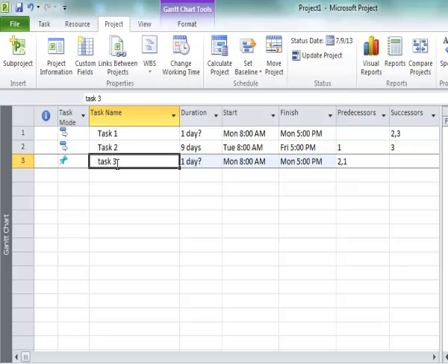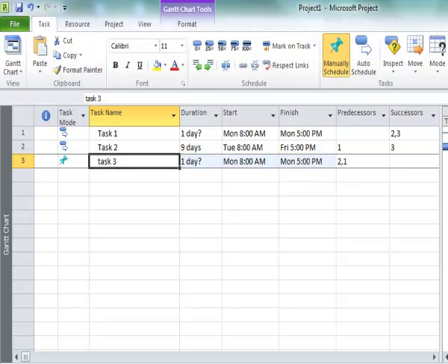Now you may wonder, what's the big deal? Well, Microsoft Project has a sophisticated scheduling engine inside of it. If you're just using manually scheduled tasks, you might as well be using a spreadsheet. There's nothing wrong with using this feature, but if you're a beginner spending $1,000 for this product, you're not using it to its full potential by turning on manual scheduling mode. So the video went through what the problem is here. You need to watch for push pins.